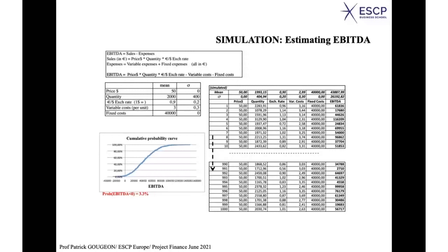I didn't do it here because with Excel it's not that simple, but with all the software that exists for simulation, you have the possibility to introduce a correlation coefficient for two variables. You have a matrix of correlation coefficients, and you can indicate whatever you want based on the assumptions you can make. Okay? Well, this is just for the first phase: how to generate a distribution of your outcome, which could be the NPV or the internal rate of return. So now we have a distribution, okay?